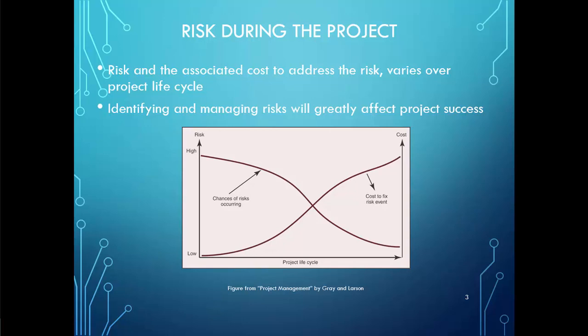When you want to make any change at the beginning of the project, it's easy to do. When the project is already approaching finish, it will be very hard to change and very costly. So the success of the project depends on how well we identify and manage risk.